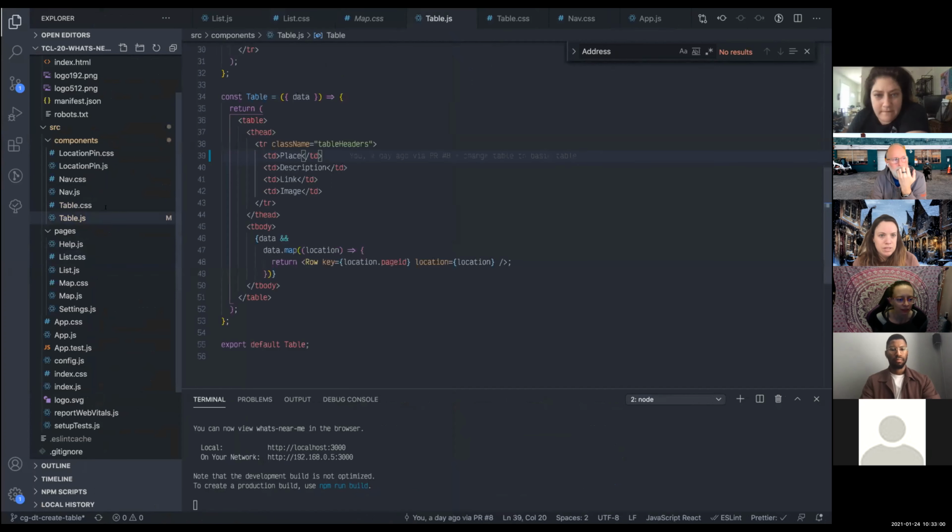Good stories are negotiable as well. We have stories on our board, but those are our idea of what we think should happen. If you're looking at the story, or you started working on it, and like Caitlin, you're like, this table is really cramped, the way you're describing the story and the acceptance criteria is probably not going to be a great user experience. It's totally valid to get in the channel or get on office hours and negotiate that a little bit. Say, hey, we started to implement it this way, but it looks like this. Do you think we should maybe do something else? And we can, as a team, decide, oh yeah, we should back out of that decision and do something that's better for users. It should be valuable, so it should provide some kind of value to some stakeholder.